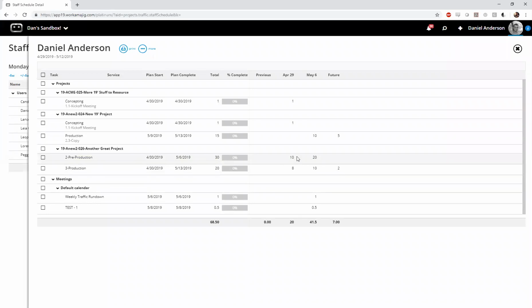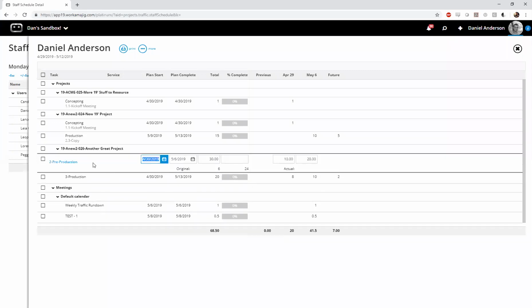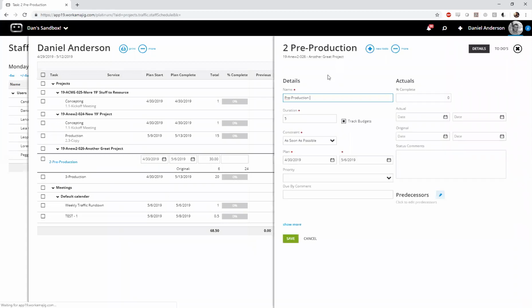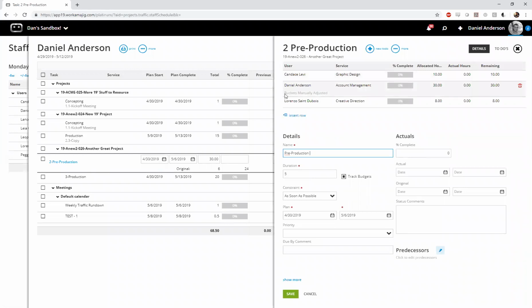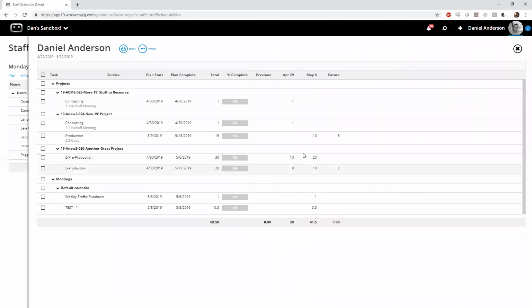Now, again, this is definitely something I would probably follow up with your account manager on because there are implications for this. We basically put a manual resourcing flag on this at this point. You'll actually see at the task level, it will say buckets manually adjusted, which basically just means that you have changed the task. You've kind of told us that, hey, I know there's 30 hours over this 2-week period, but I want to tell you how the system should resource this. Don't use the manual or the automatic resourcing. So from this point, we will never change these hourly allocations.